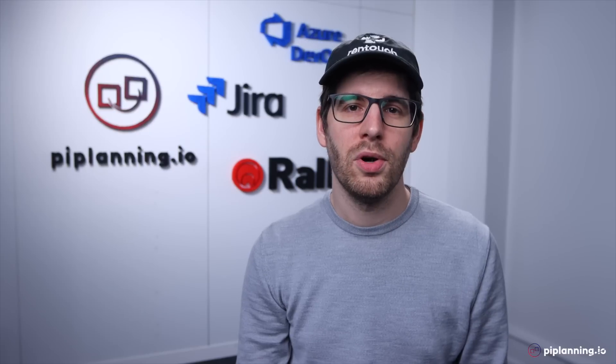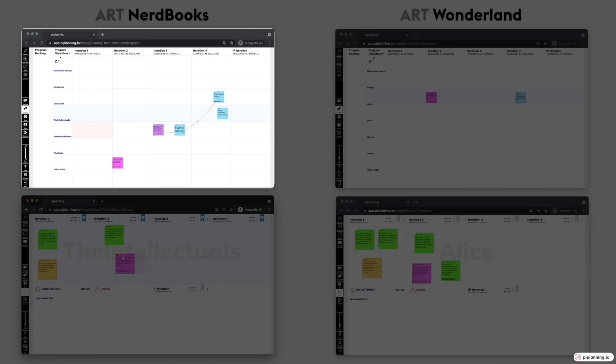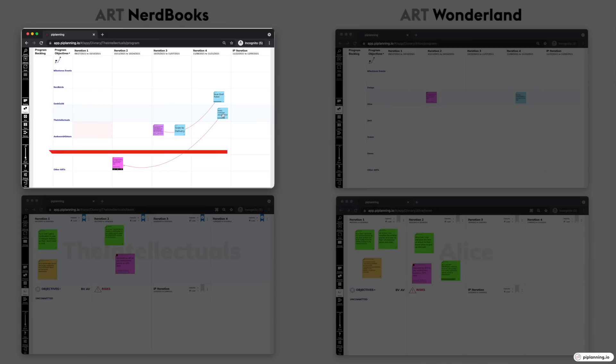On your ART's program board, you will have all dependencies to other ARTs visualized in its own swim lane called Other ARTs. It's simple but highly effective.